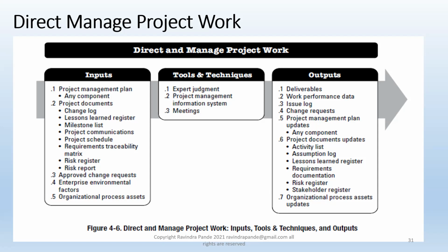Are there any challenges, in terms of projects being in red, in terms of projects that need very critical help? Project in red means they are really derailed, or what I can say, deviated projects, or the plan has not been very great for those projects. There are yellow projects, in the sense they are going into the danger zone, so we need to stop them. We need to provide some help, be it providing an expert, some additional resources, some bench resources, some quality management resources, and so on and so forth.